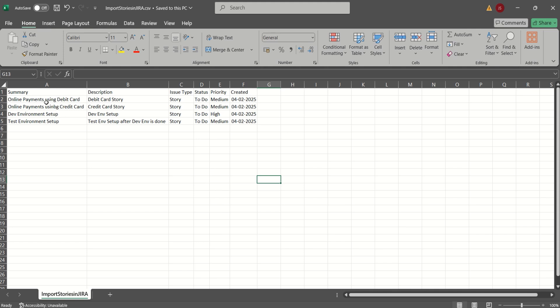The very first one, online payment using debit card, that's the summary. Then we have a description, debit card user story, issue type is a story, status is marked as to do, priority is medium. So similarly, we have placed the remaining user stories. So there are four user stories as part of this CSV file.